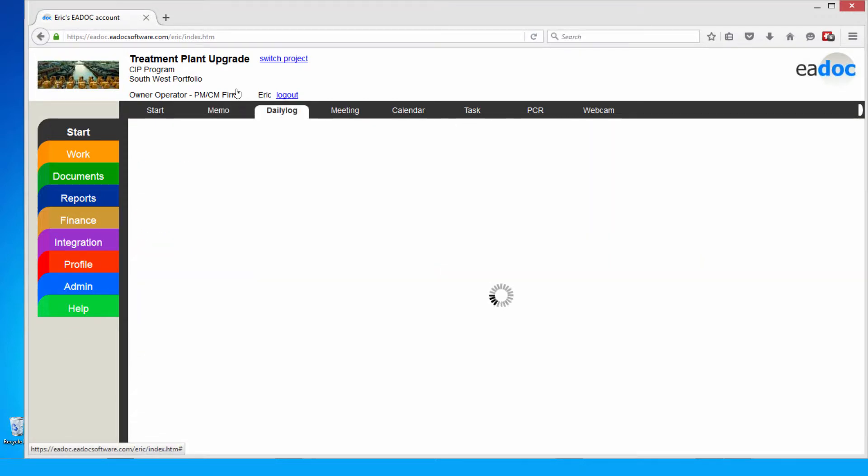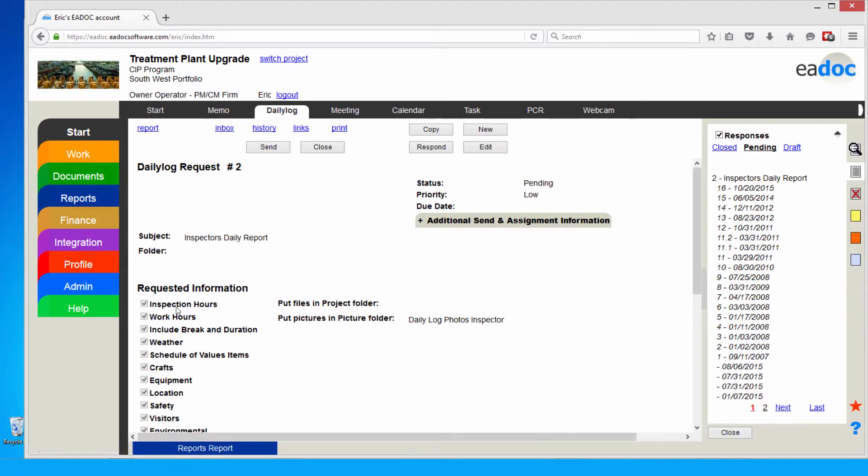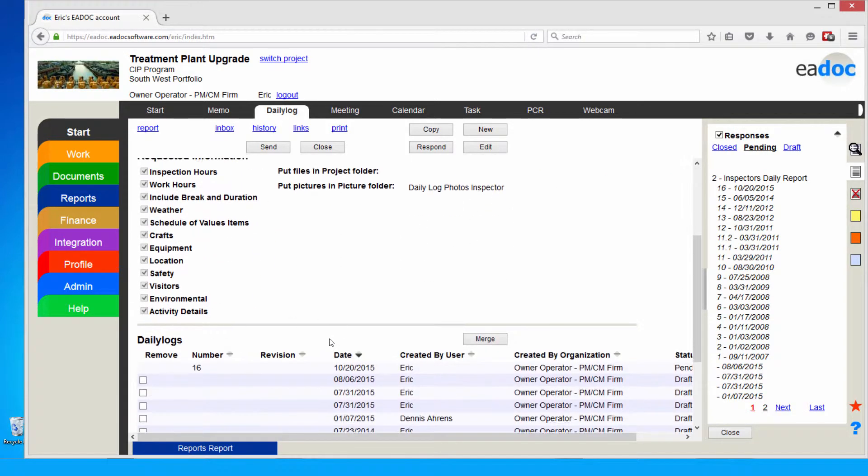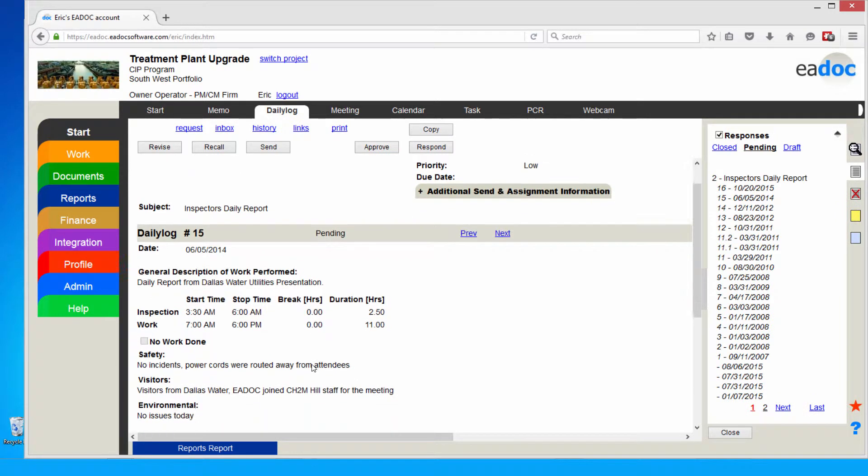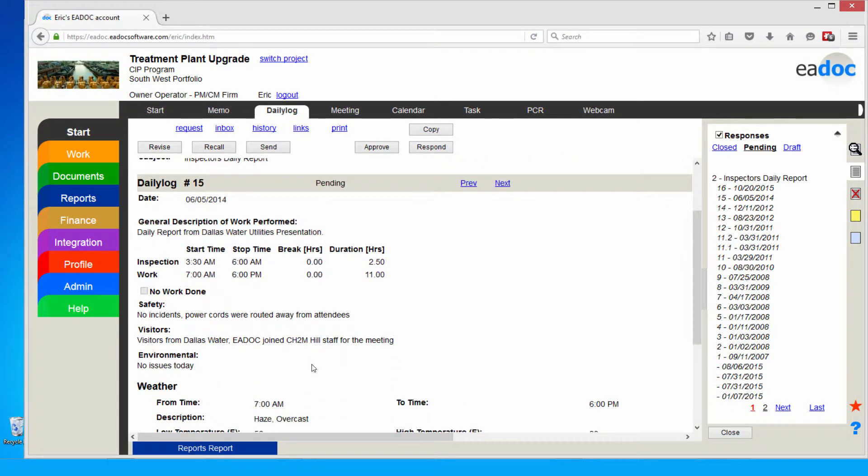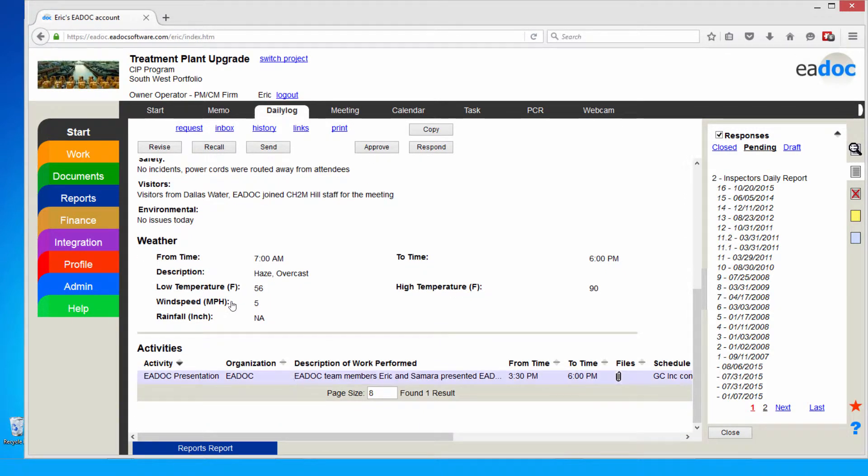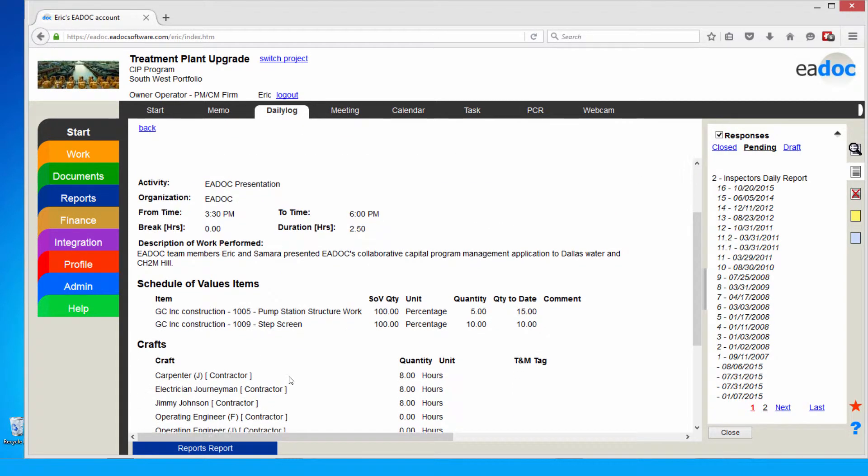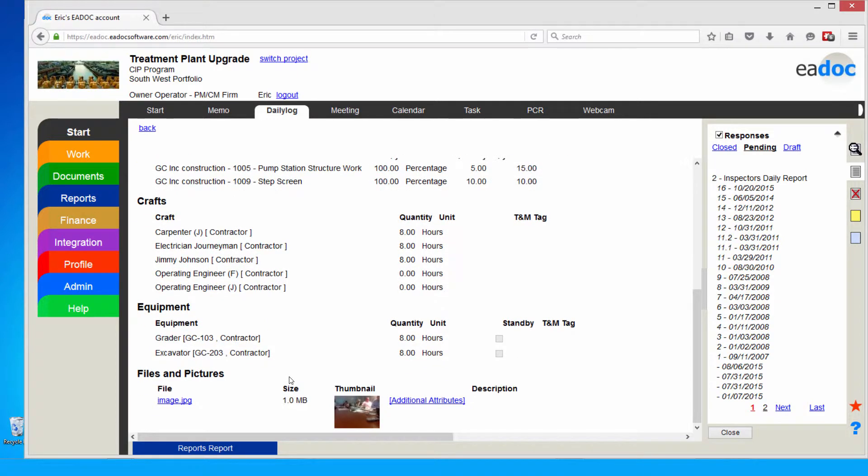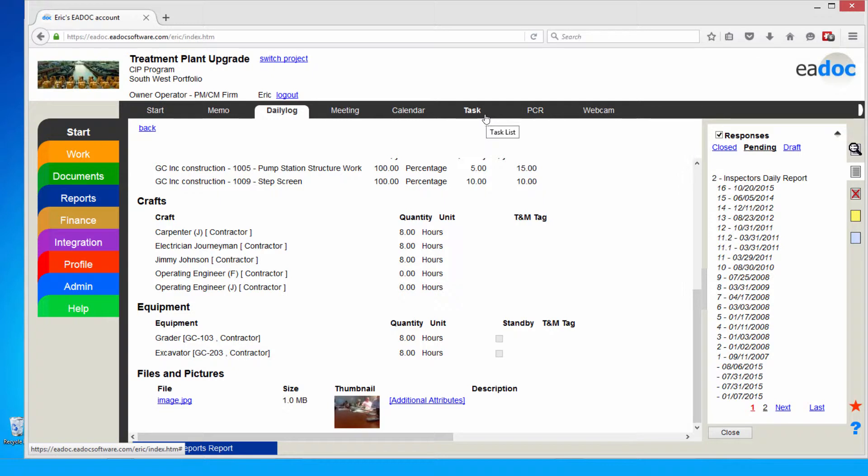We've got the inspector daily reports. This really complements the use of tablets in the field. With my daily reports, I can actually capture the information in the field that my inspectors are working on. Safety, visitors, environmental, the weather can automatically come in from a local weather station. Then I can have my detailed daily reports. Schedule values, crafts, and pictures. This is a great place for tablets because I can be capturing the pictures in the field. We've got a lot of functionality and capabilities for helping you manage the projects. We can go through media agendas and minutes, project calendars, tasks and action items that we can assign to users and organizations. We can even set up custom tabs and forms, like a public contact form, that you can fill out and track. The key advantage to running it through the system is the ball in courts, the reporting capabilities here in the application.